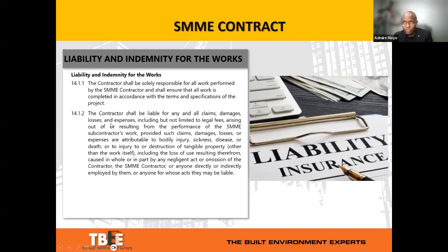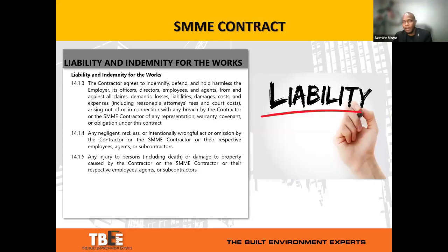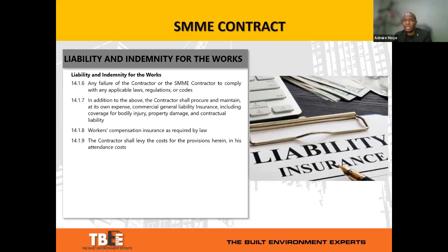Again, this clause is subject to revision where the parties are in agreement that SMME contractors are direct contractors. So if the employer decides, well, I want to contract with the SMMEs directly at the exclusion of the contractor, the SMME contract is still applicable because it addresses the roles and responsibilities of the various parties, but you can then alter the specific clause to ensure that any form of liability and indemnity is at the exclusion of the contractor.